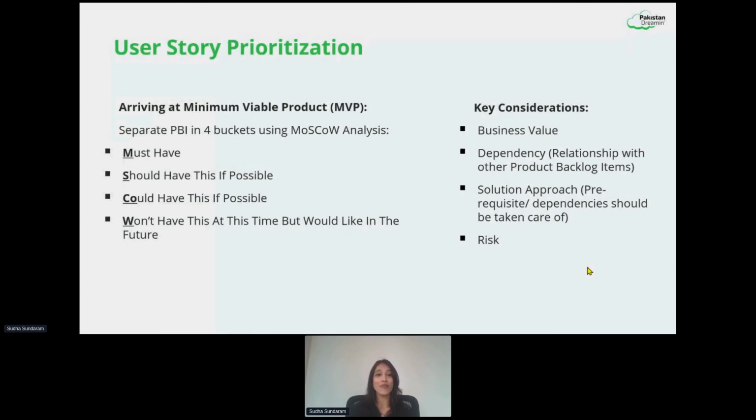So while we're talking about case management or your knowledge article or any of this to become valuable, first of all, we need to do something because there's a prerequisite, there's a solution approach to how we do this. We need to ensure the org is set up. We know what the profiles are, we know what their personas are going to be, how the permissions are going to be handled, the typical org setup itself, right? Because it's going to be one of the key factors for us to build any other features down the road. And it's going to essentially become more valuable to the customer.